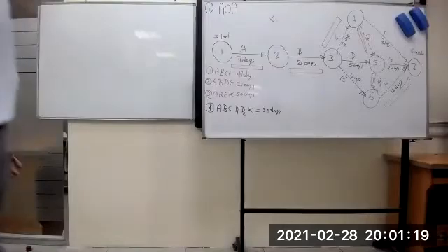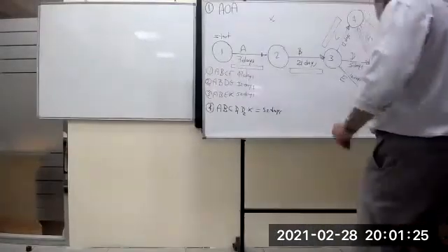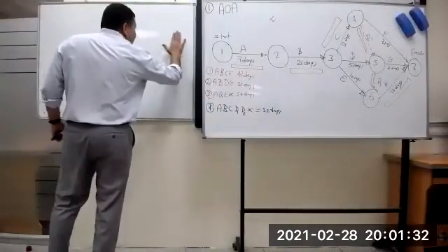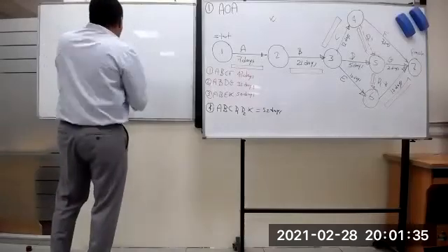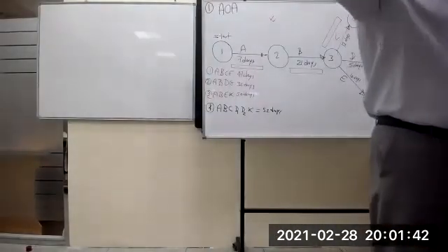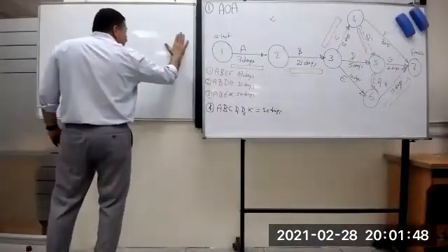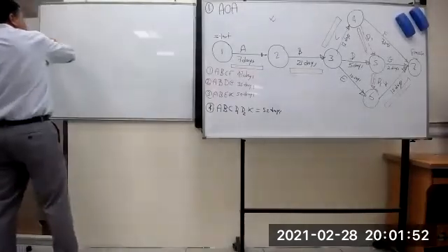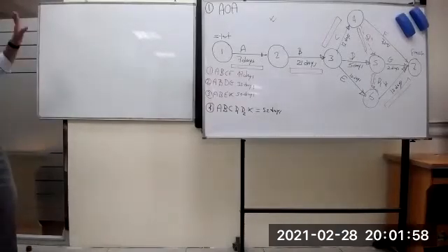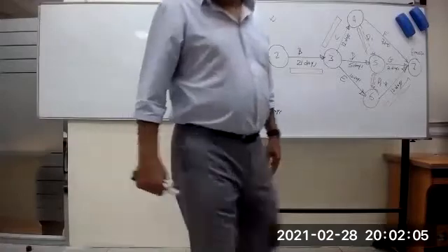If you are having predecessor, how are you going to start? Predecessors always start from the end to the start. From the end, start from the right hand. This is the end, go for the left hand. When you draw it at home, try to apply this technique. When you have a predecessor table, start from the end, backward, in this direction. Now, if you have successor in your table, start from the start to the end.